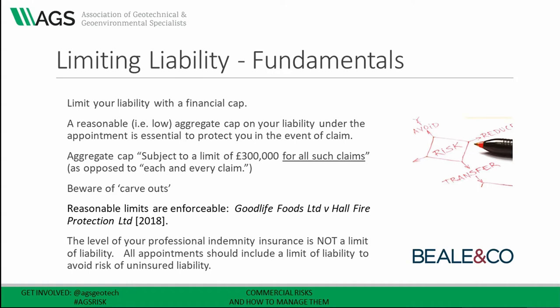Any clause that aims to limit liability must pass the test for reasonableness, and each case depends on individual circumstances. Courts will look at the level of your fee, the nature of the work, the nature and experience of your client — whether they are a commercial entity or private individual — the availability of insurance for that type of loss, and any limitation clause must be drafted using clear, unambiguous language.